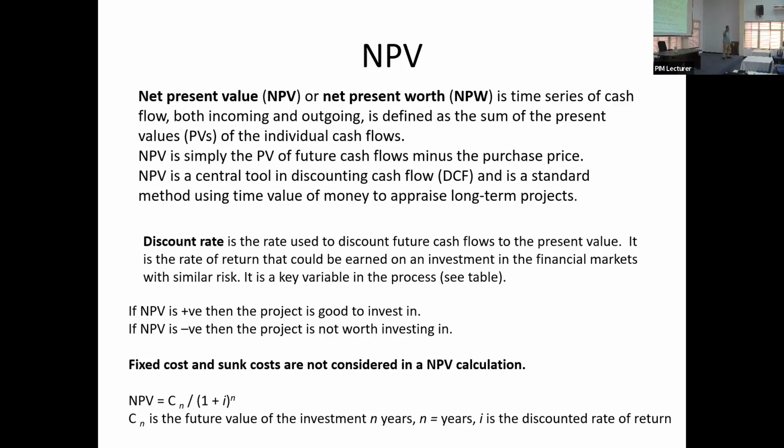Now, 5 years later, you look at it to start this project. Whether you start this project or not, that is already paid, sunk cost. No point bringing that into the project cost. So there are costs that you will take, there are costs that you wouldn't take. If you hire a consultant to advise you during the project, that will come in, because it's part of the project.